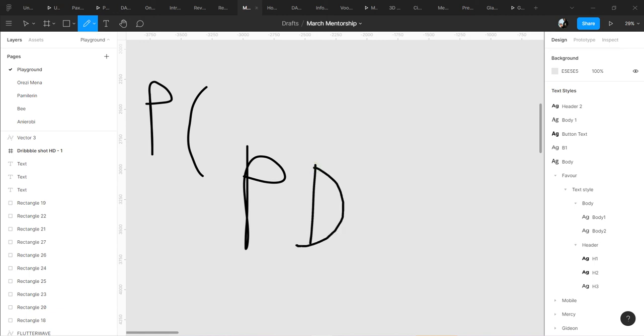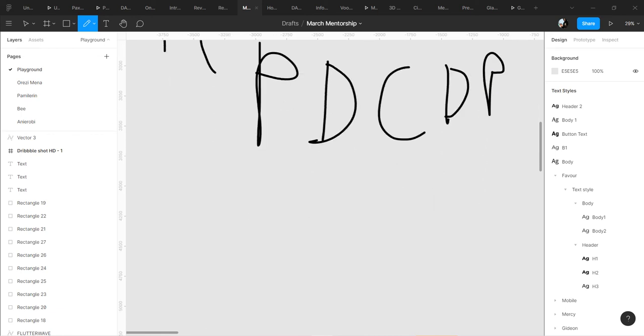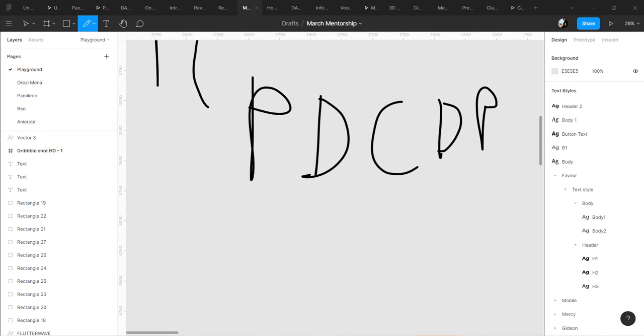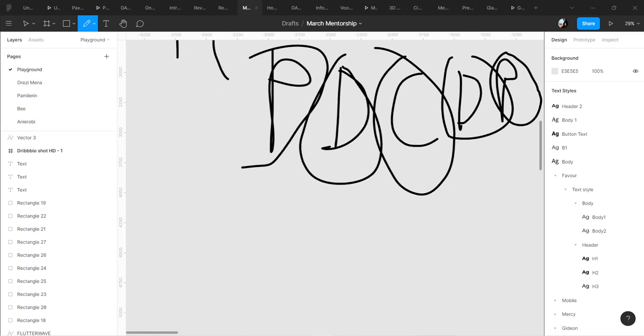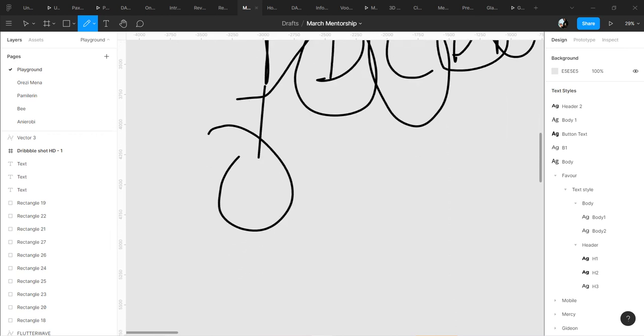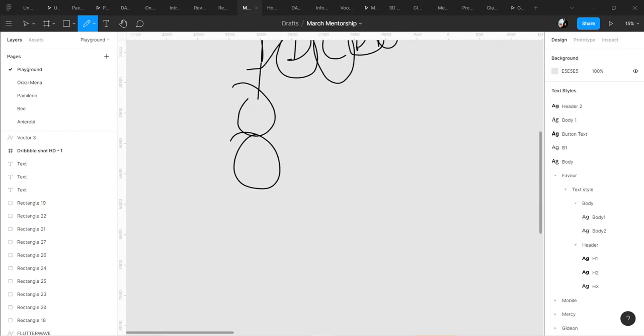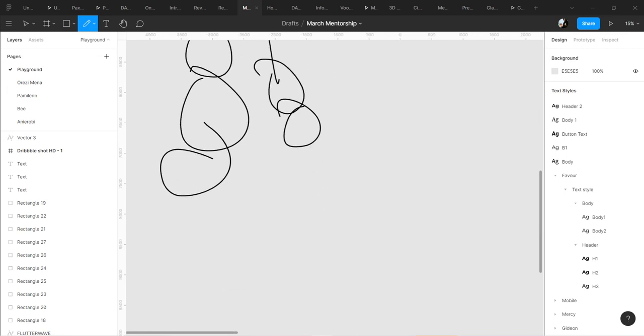create this design story, I don't want to have to create the code, the doc, and the publish story every time. How do I automate that in such a way that when I create a story, it automatically creates propose for me, design for me, code story for me, doc story, and publish story? And not just that, it goes a step further and, for the publish story, populates it with all the subtasks I may need. For the design, same thing, it populates it with all the subtasks.